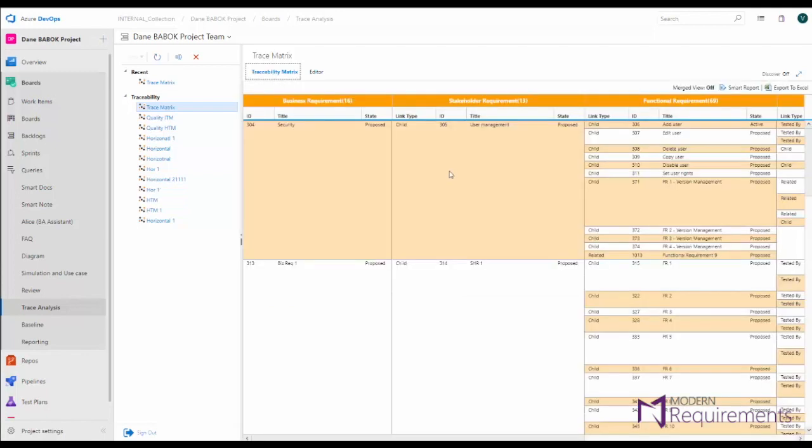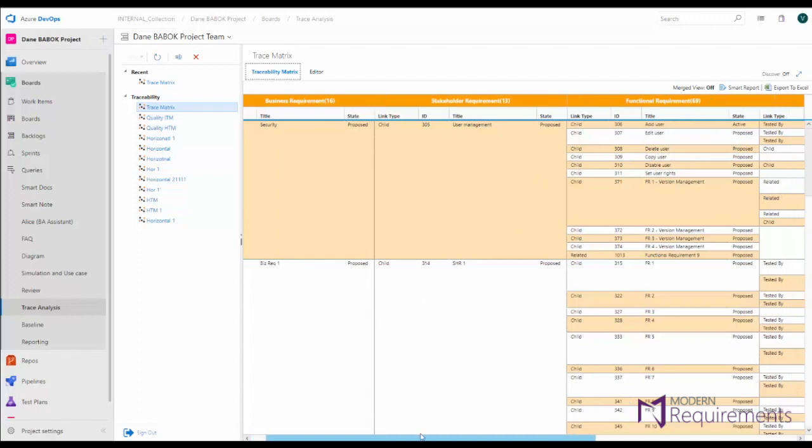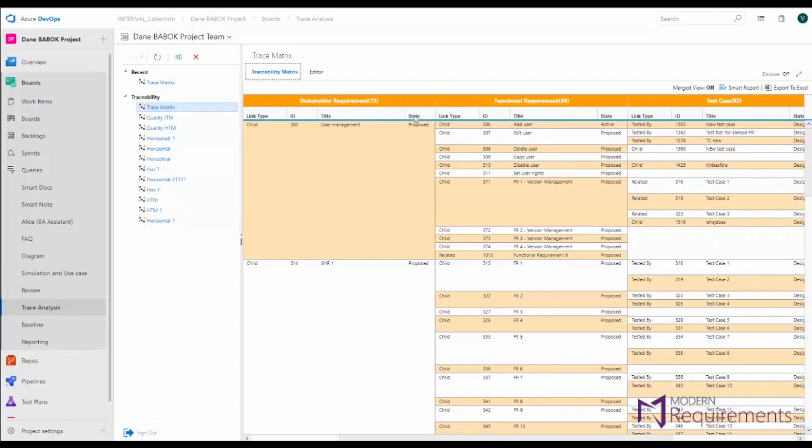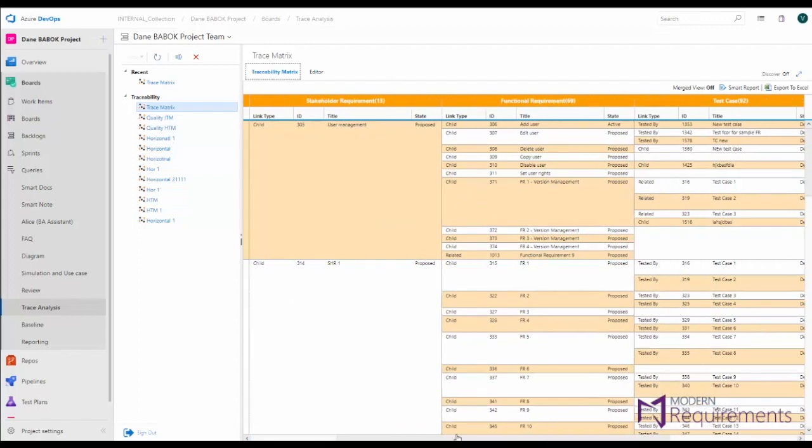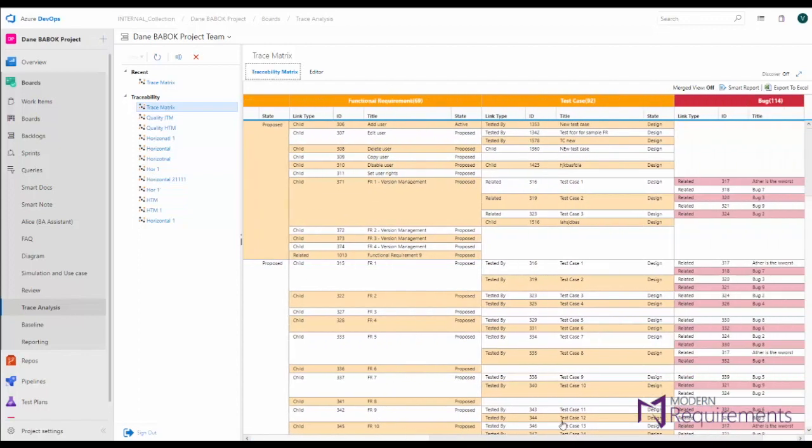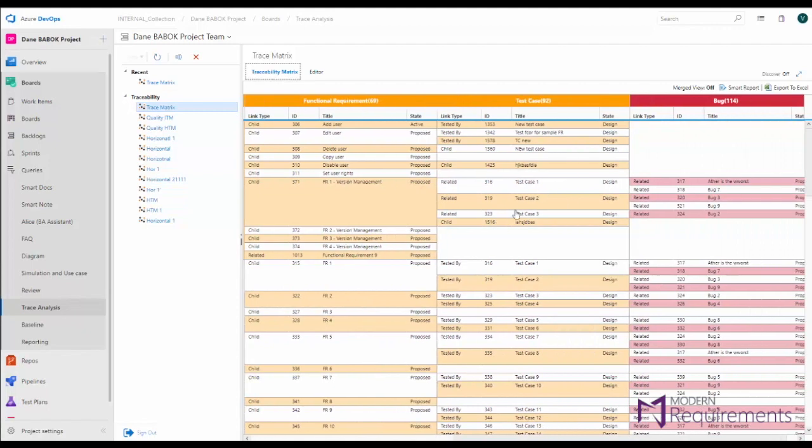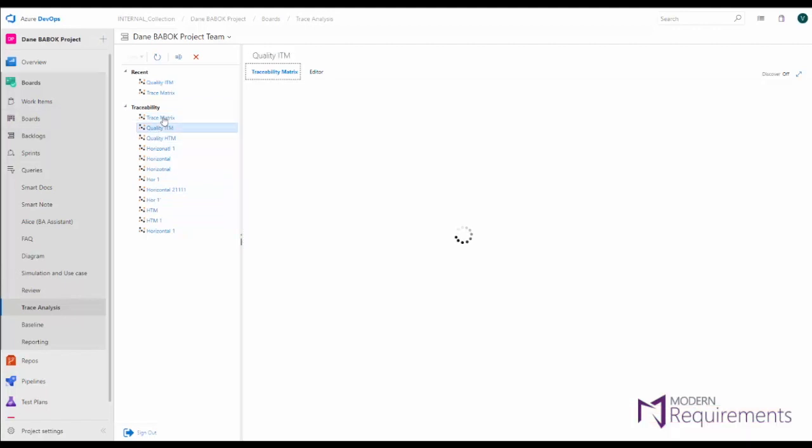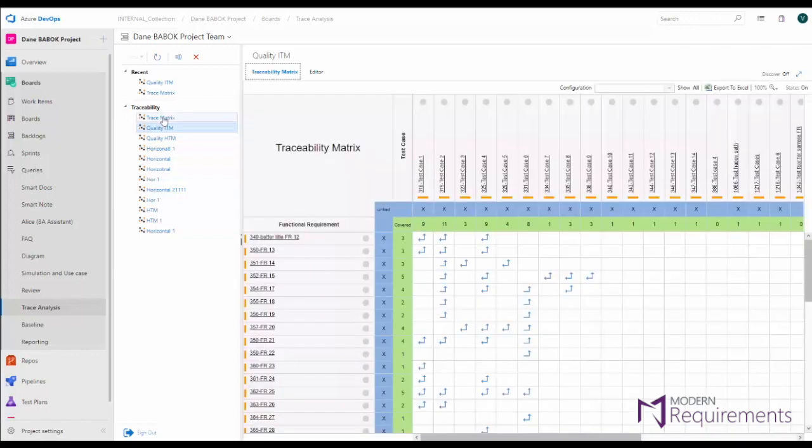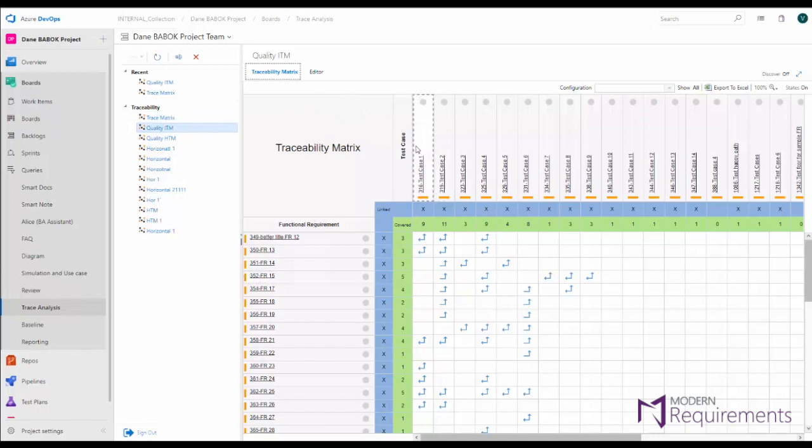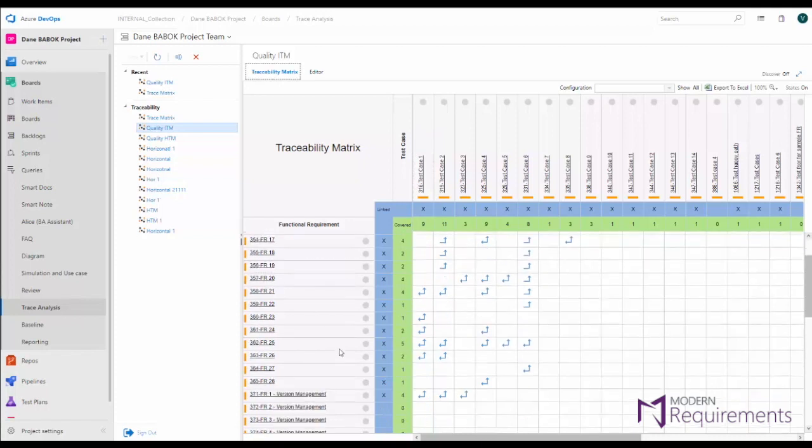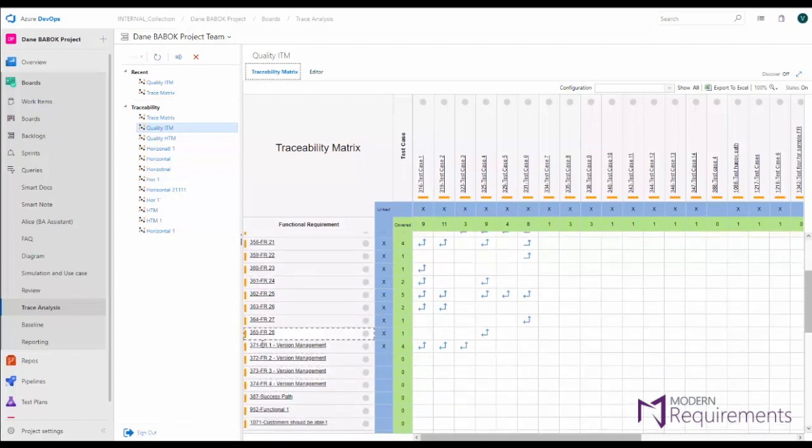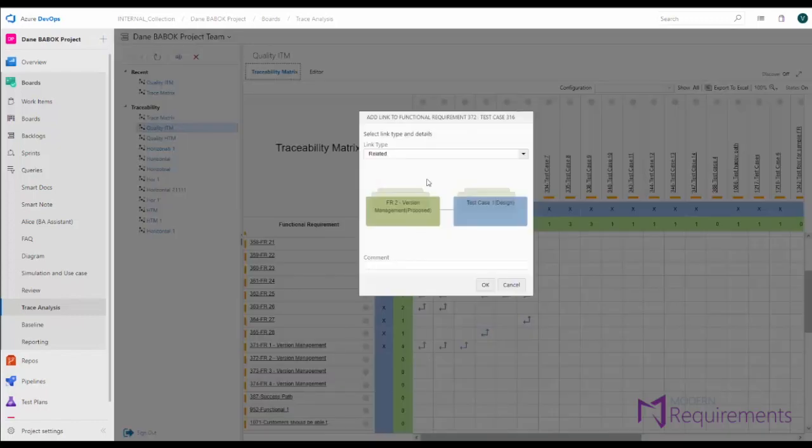We're able to run that matrix and see how this business requirement turns into stakeholder requirements, how those stakeholder requirements turn into functional requirements, those into test cases, and those test cases into bugs. So you can trace your project all the way through. And again it only took about 15 seconds to create and we also let you manage the relationships between requirements.